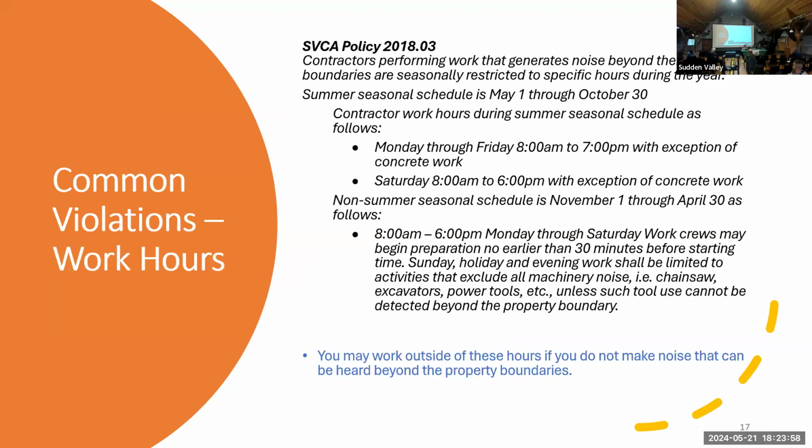Work hours, it's another popular one. The summer seasonal schedule, which starts May 1st and runs through October 30th, is Monday through Friday, 8 to 7, with the exception of concrete work, and Saturday, 8 to 6. But it's important to know that you can work outside of those hours as long as what you're doing doesn't cause noise.